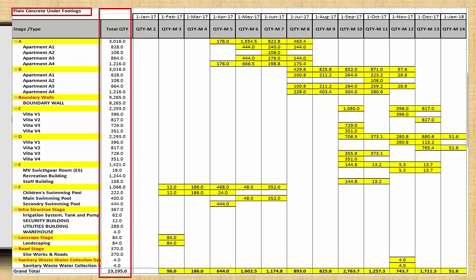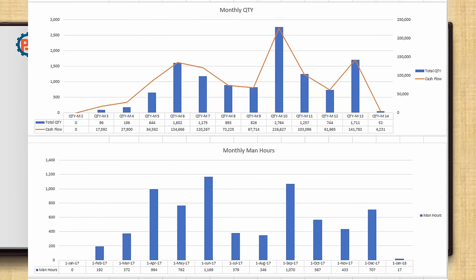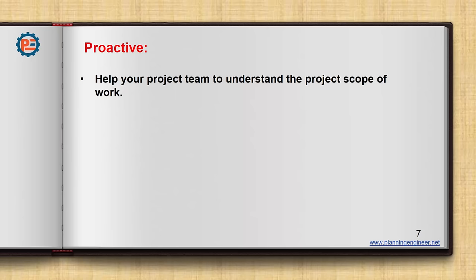What else you can give them? You can give them the expected quantity each month or each week. We have two templates here. If you use the week's template, you can make the quantities per week, or if you use the month's template, you can use the quantity per month. But it is very important to tell them, okay, these are the quantities required for each month. Is it enough? In my opinion, no. You need also to give them better understanding by the graphs. So here we have given them the monthly quantities along with the expected cash flow from this specific item. Also, we give them the man hours. So whenever you are trying to help them to understand the scope of work, what is exactly required, you will be a proactive planning engineer.